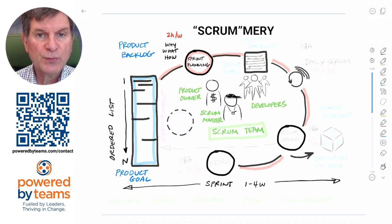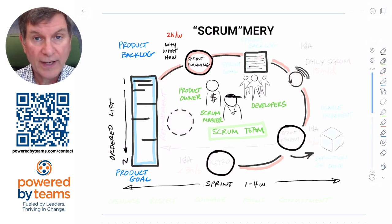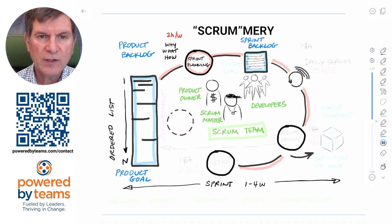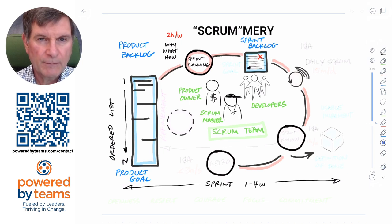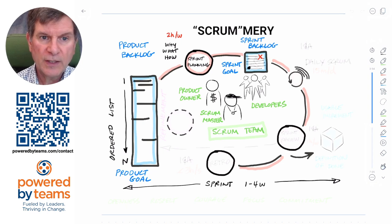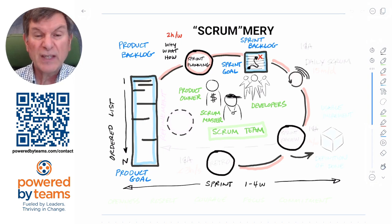The product owner should come into sprint planning with a set of selected product backlog items that are candidates for the sprint — that's the what element — and a why: something that helps them hang together. During sprint planning, items are pulled with the developers into the second artifact, the sprint backlog. The sprint goal drives cohesion and focus for all the work during the sprint, and by the end of sprint planning the team should agree on it. The how element is the developers taking those product backlog items and figuring out how to turn them into valuable increments by the end of the sprint.